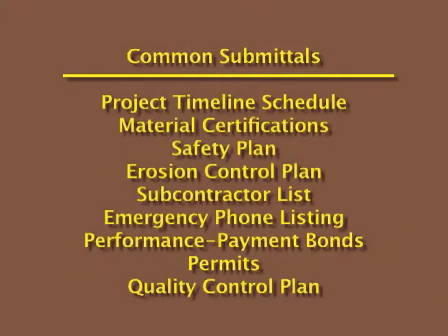Usually it's a couple weeks by the time the contractor has to get his bond and his insurance together. He's got a little bit of time before he can actually get to work in the field, and that gives us a little bit of time to review submittals. And then, with the submittal of the performance and payment bond and the other necessary submittals prior to construction, we're actually ready to go out and begin construction in the field.